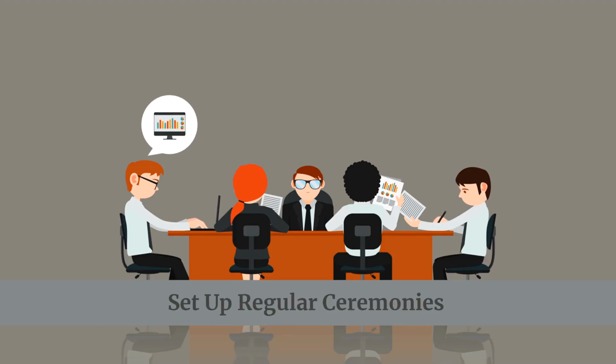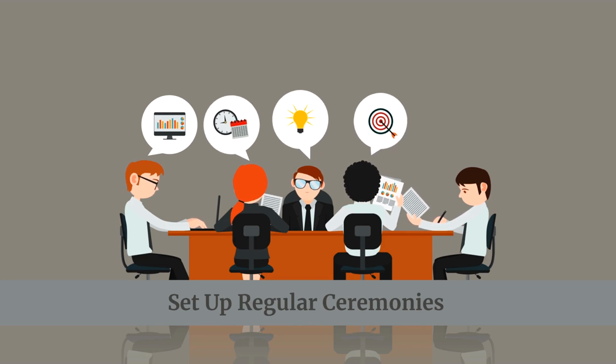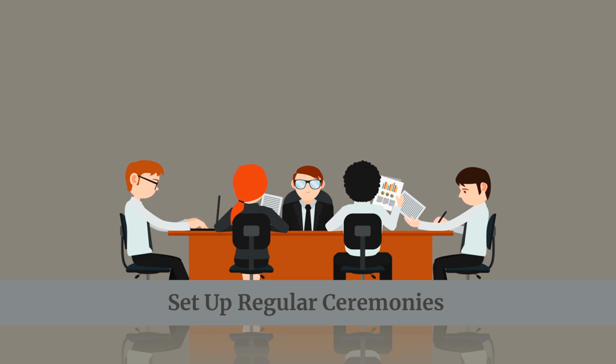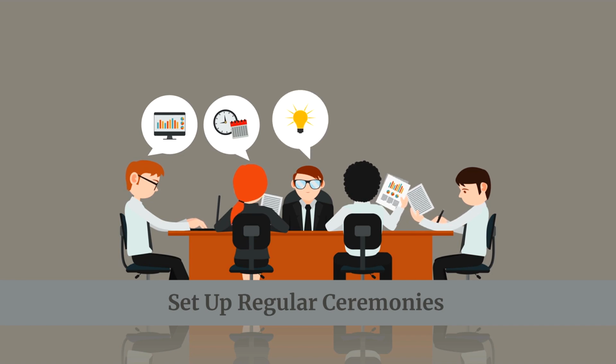7. Set up regular ceremonies. Schedule and conduct Agile ceremonies, including daily stand-ups, sprint planning, sprint review, and sprint retrospective meetings. Ensure that these meetings are held at consistent times to promote routine and predictability.